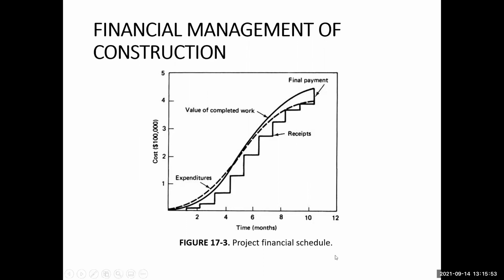Okay, you have tried to answer it, but anyway, the answer is that the contractor spends the amount first, then sends the bill to the client, and then the client pays the bill. For example, the contractor has performed this much amount of work by the end of the first month, but will get the payment for that amount at the end of the next month.